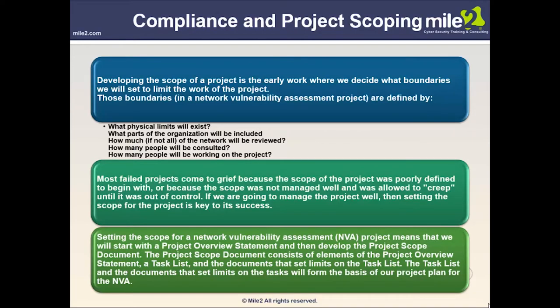Compliance and project scoping: developing the scope of a project is early work where we decide what boundaries will limit the project. In network vulnerability assessment, boundaries are defined by physical limits, which parts of the organization are included, how much of the network will be reviewed, how many people will be consulted, and how many will work on the project. Most failed projects come to grief because the scope was poorly defined or not managed well and allowed to creep out of control.